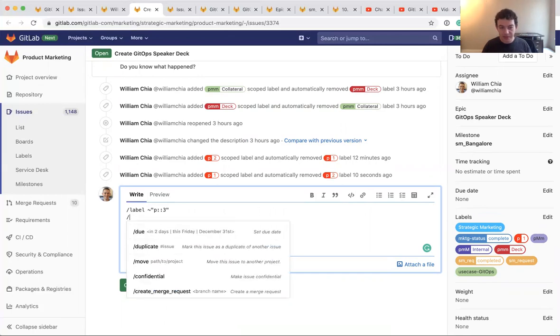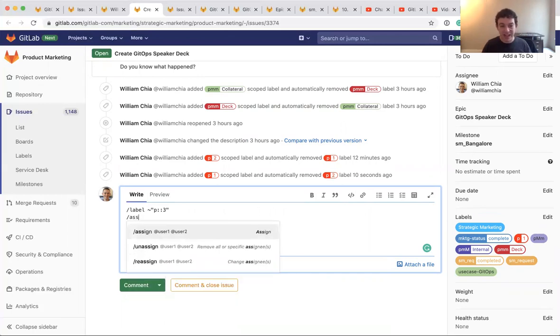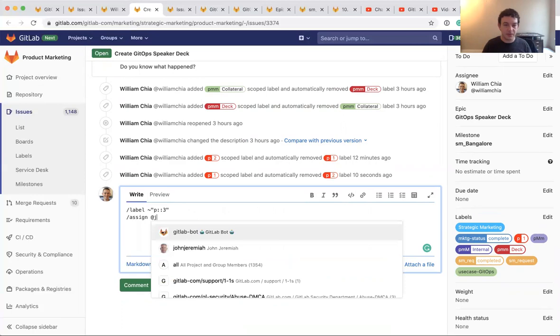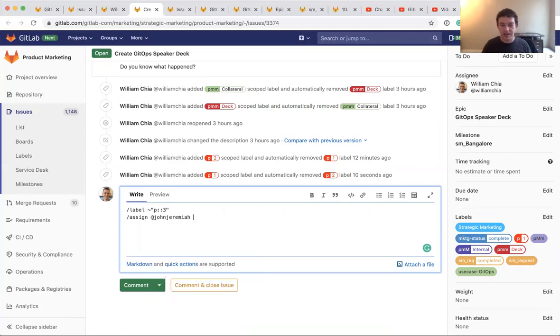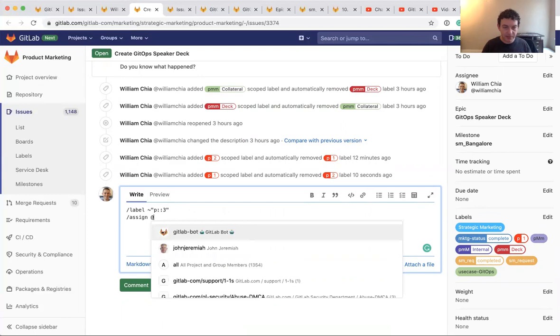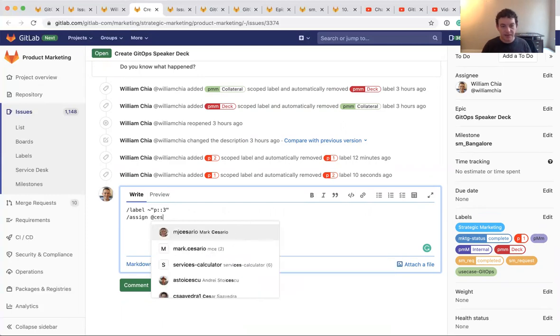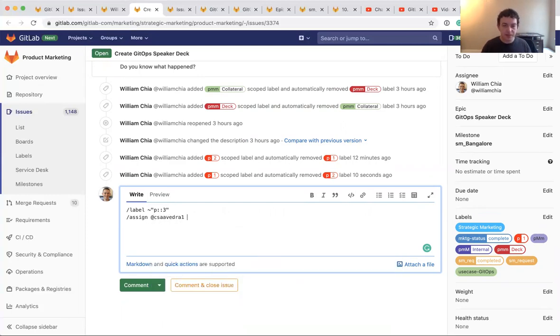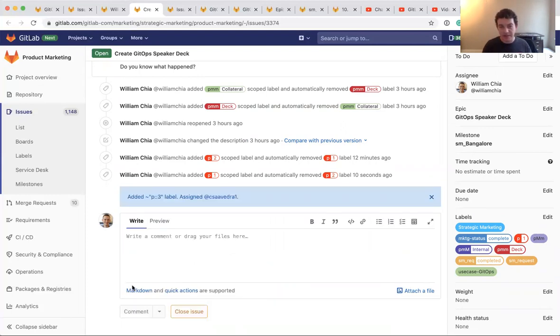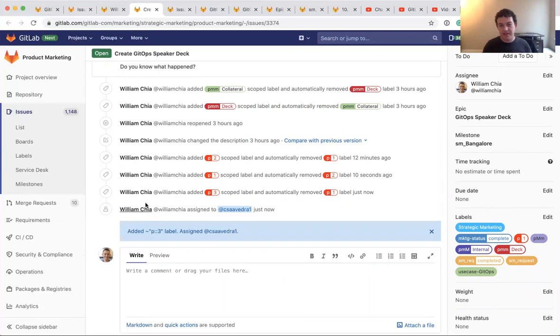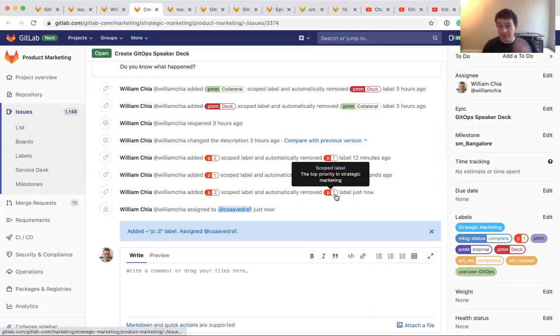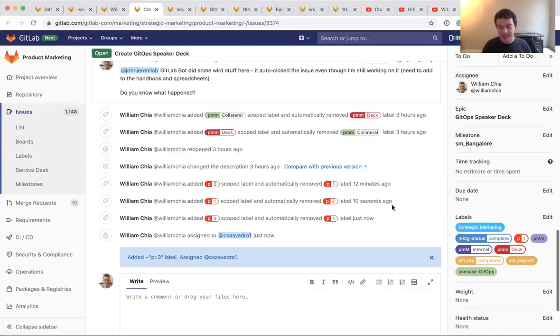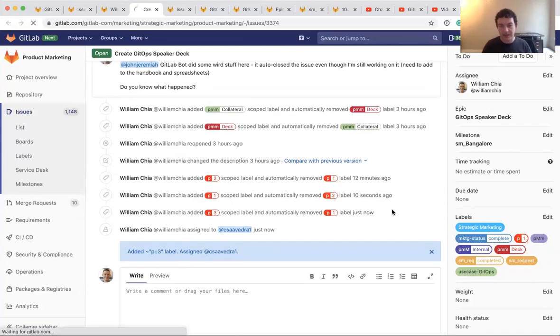One way to do it would be to go here to add the labels and change the labels here. Another way to do it would be with a smart action or a quick action. So if you do slash label and then tilde, and then here I want P colon colon, let's say P three. So if I had a comment with this quick action, quick actions are really nice. They're easy to add milestones. You could add a milestone. You could change the milestone. You could assign it with this. Let's say I also want to assign John to this one, or maybe Cesar, we'll assign him as well. So these quick actions are nice. And when I assign this label of P three, when I comment with that, you can see it added the P three and it removed the P one because it's scoped, right? You can only have one of those and it assigned Cesar for me.